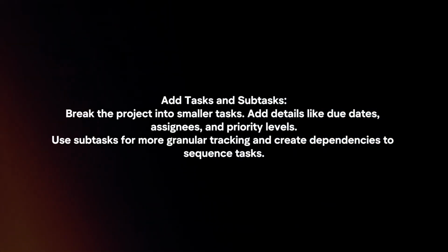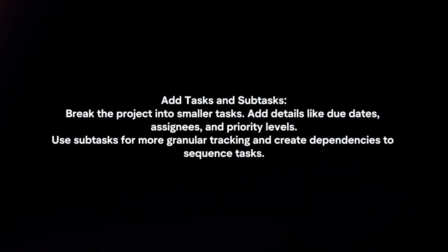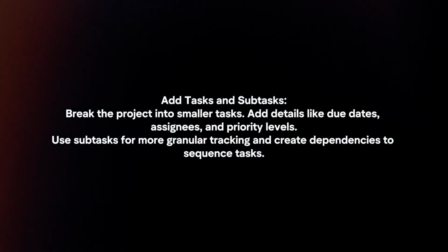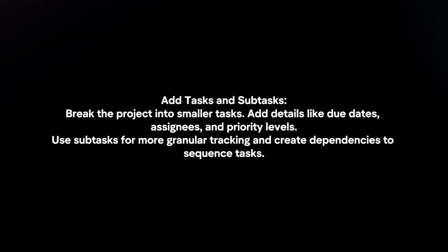Add tasks and subtasks. Break the project into smaller tasks. Add details like due dates, assignees, and priority levels. Use subtasks for more granular tracking and create dependencies to sequence tasks.